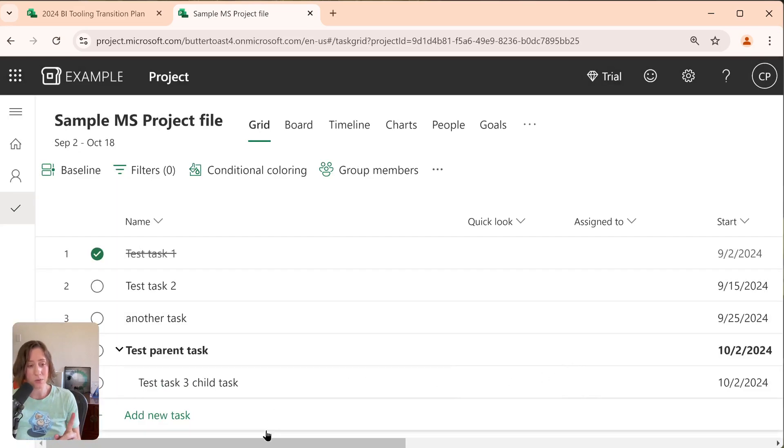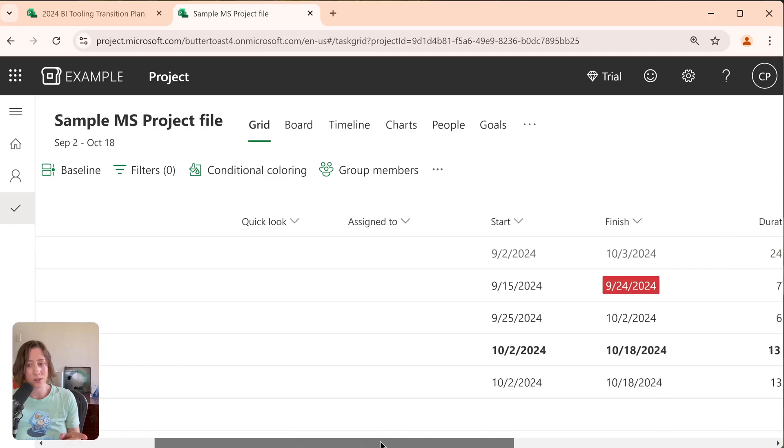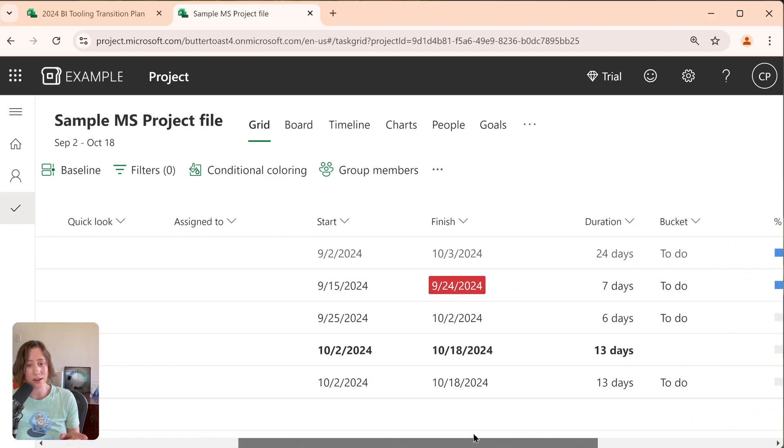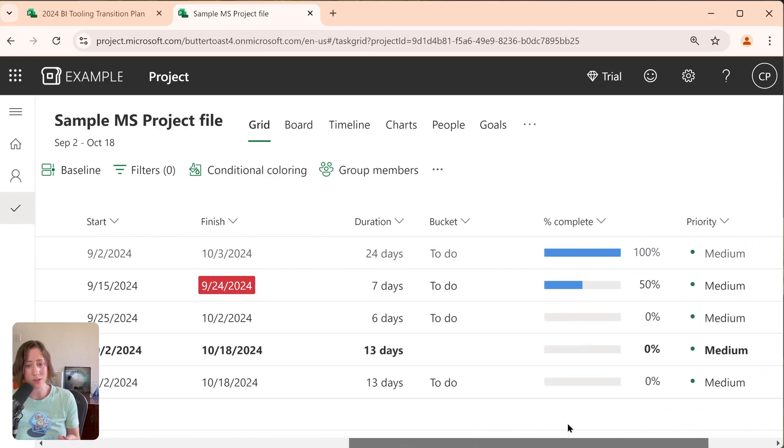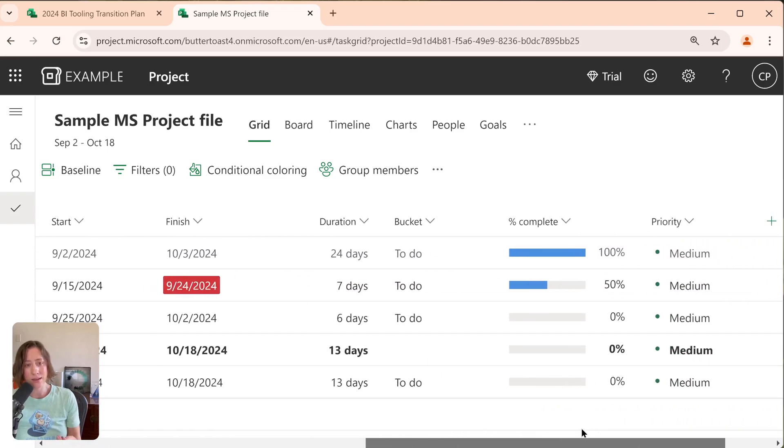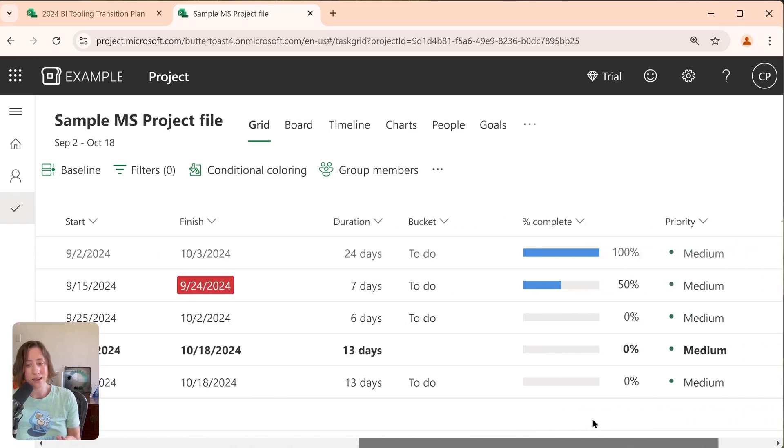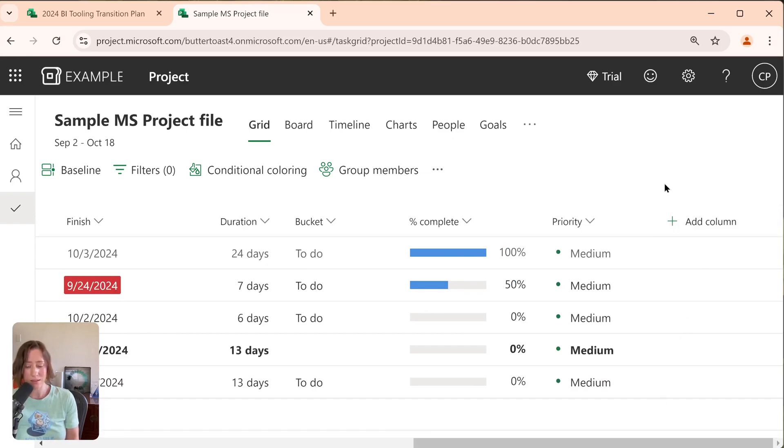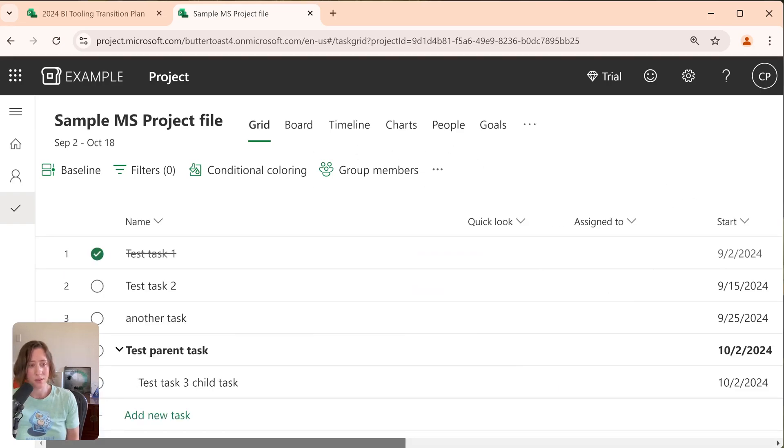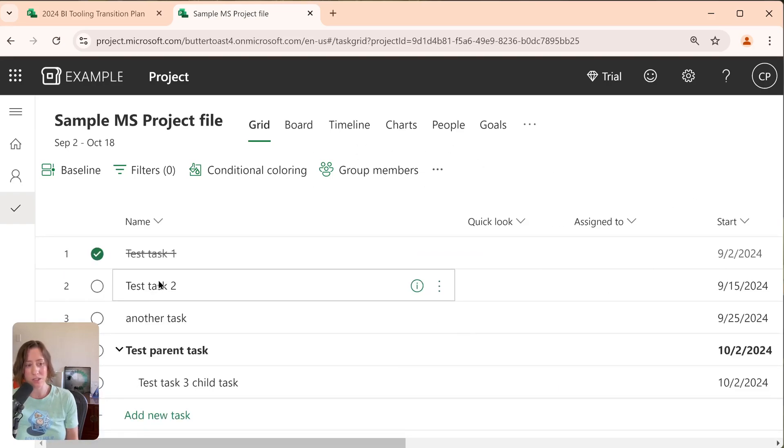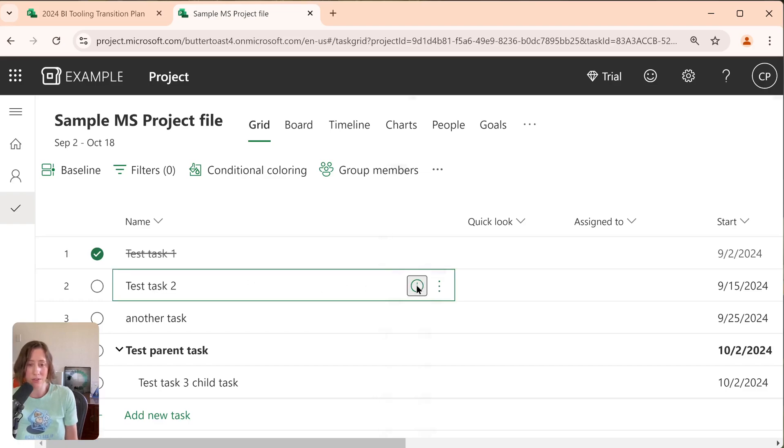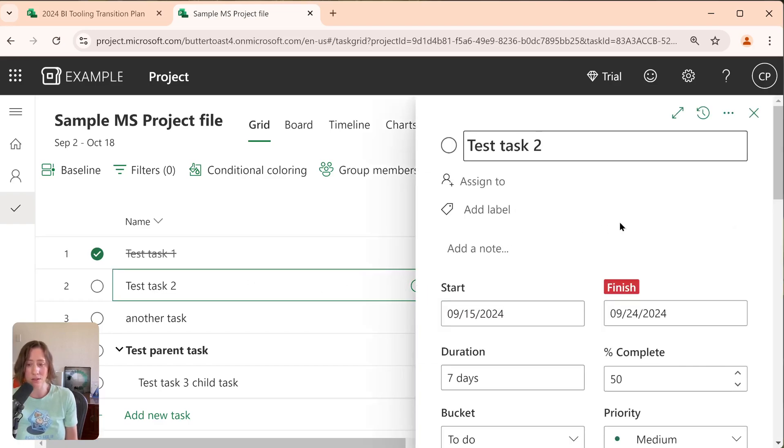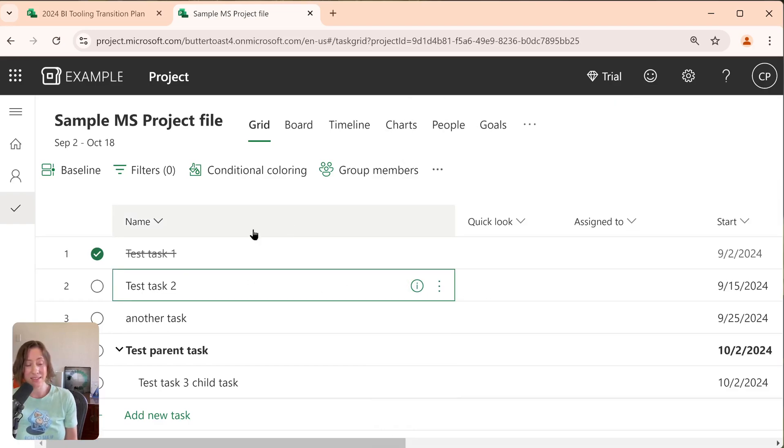So this one, you'll notice that it has the start and finish dates. It has the percentage complete. It does not have any of those custom columns. So although you can add the custom columns in the desktop app, it doesn't seem to want to import those. The flags are also kind of part of the custom column situation in the desktop app. So those also didn't import.